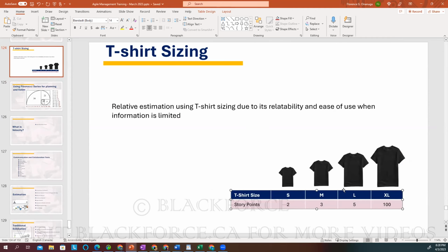But you must have a form of measurement in your team so that you can say, as a team, when we commit to a 2-week sprint, we can finish 25 story points. What that 25 story points means might be 3 stories, 4 stories, or 5 stories. But what we know is that from the prioritized stories, we can finish 25 story points.